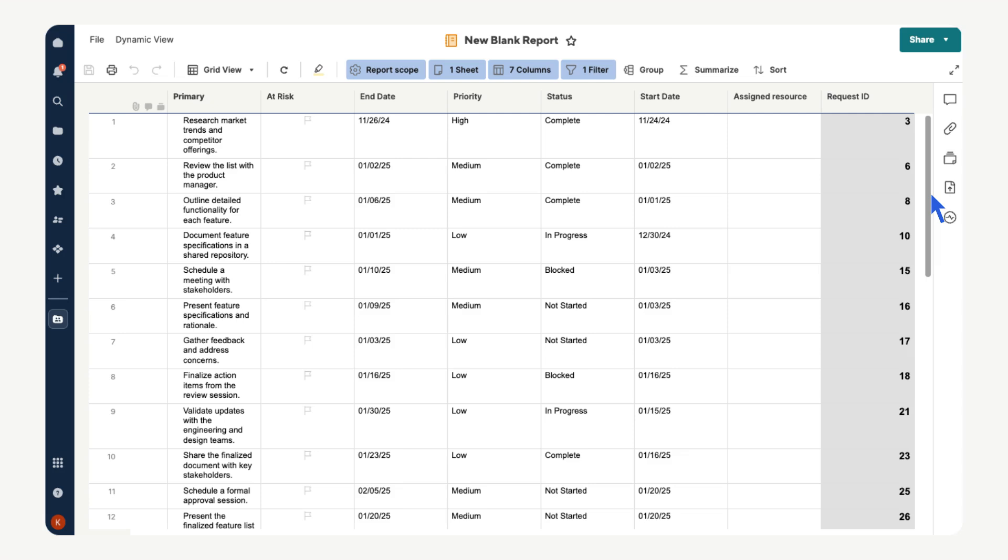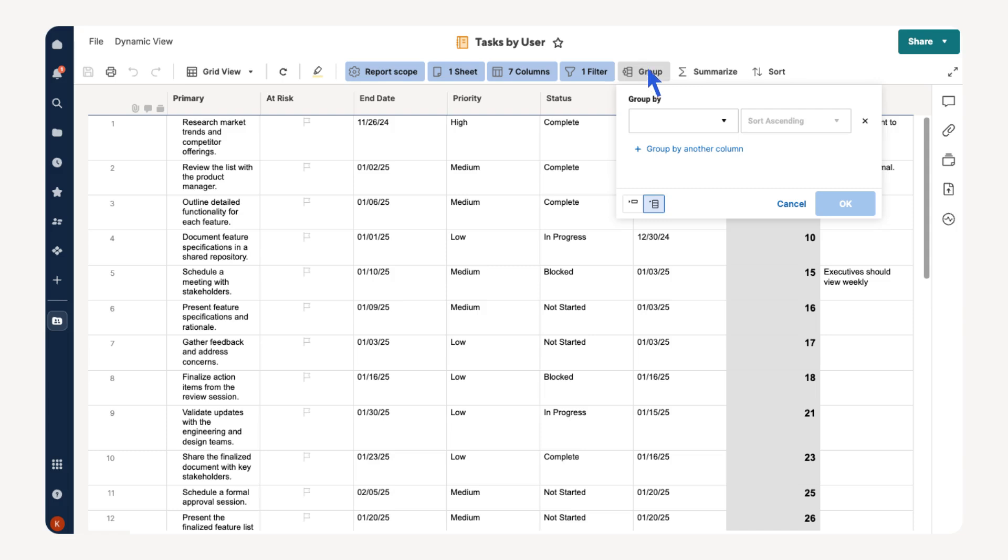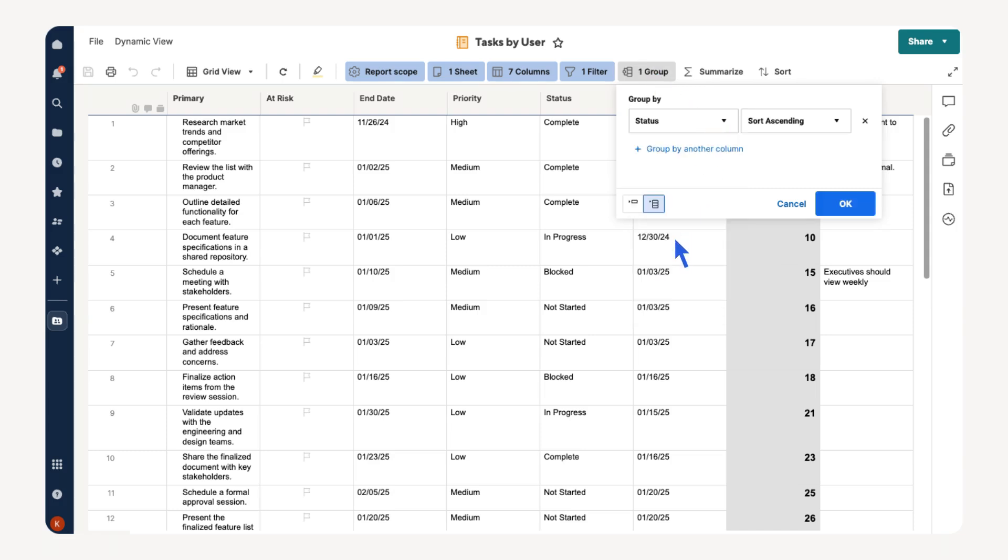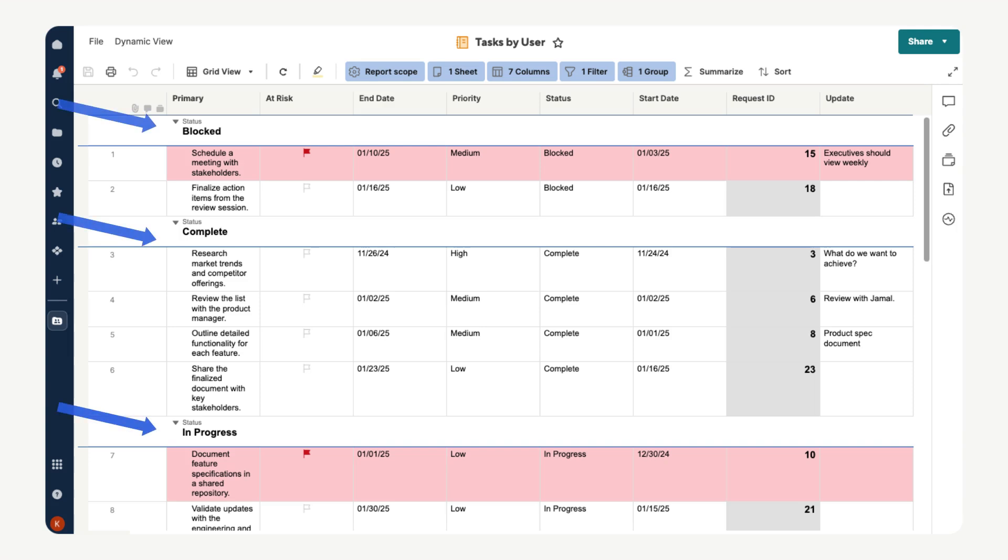If we want to organize our report we can group the rows based on any columns from our sheet. Let's group our report by task status. Select group, then open the drop down list of columns and select status. You can also organize the rows in the groups in ascending or descending order. We will leave the report in the default ascending order. Next select ok. Now your report is grouped by status making it easy to find the tasks that need your attention first.